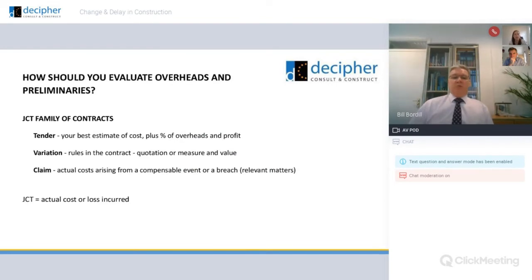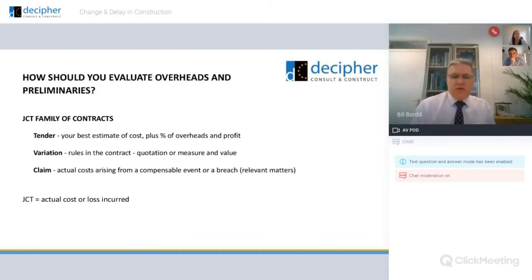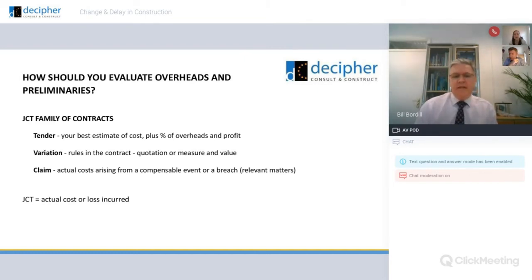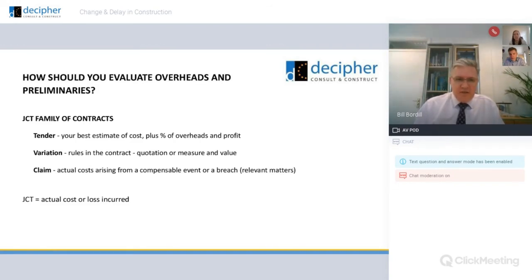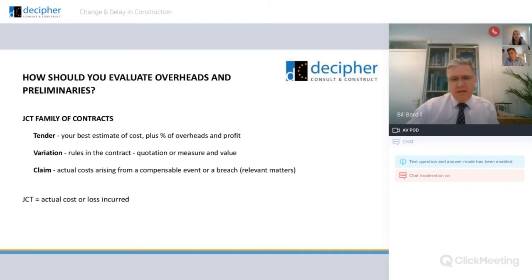How should we evaluate preliminaries? In the JCT context, it's very unprescriptive. You're able to value your tender however you choose; typically it's your best estimate of cost plus a percentage allowance for overheads and profit. People would typically list out what their prelims are and price those as elements. Variations are prescribed on a measure and value basis, and claims would be the evaluation of a compensable event — a relevant matter under JCT. The JCT has a loss and expense clause generally based on actual cost or loss incurred.